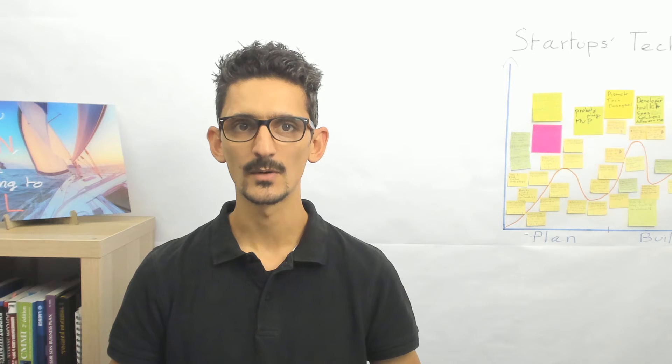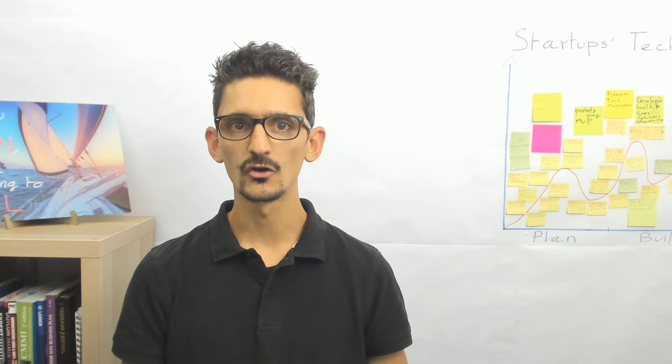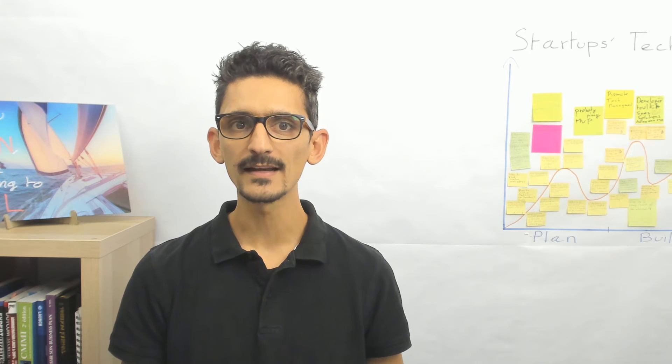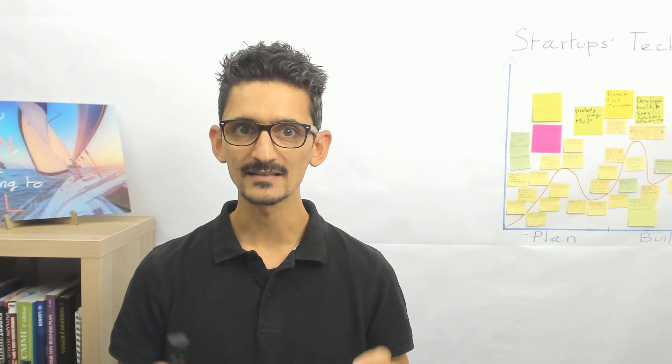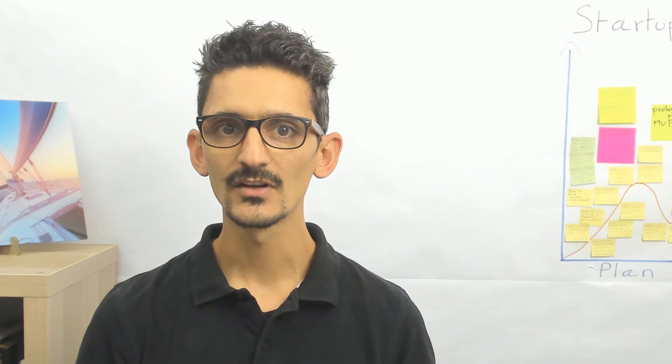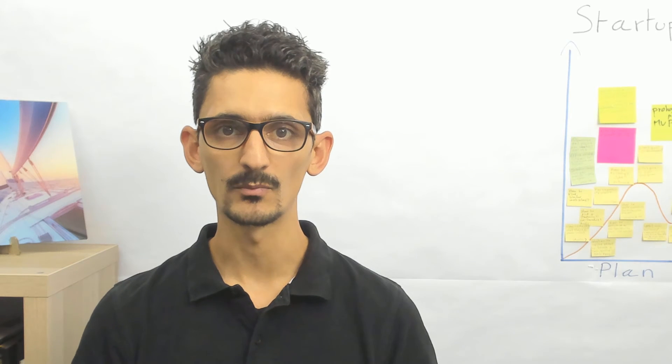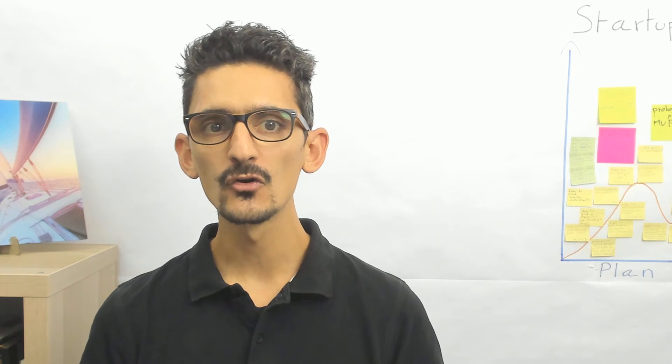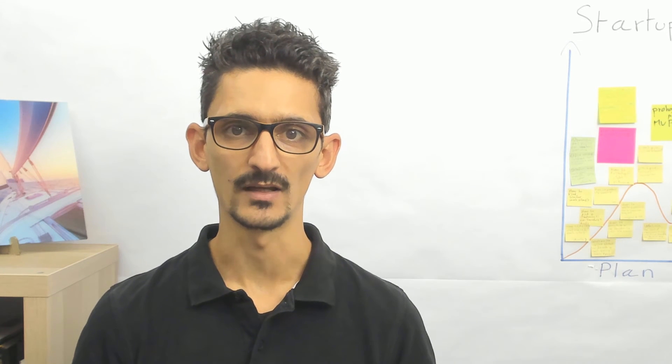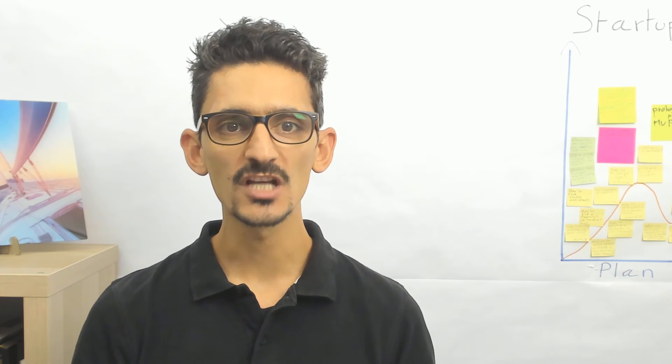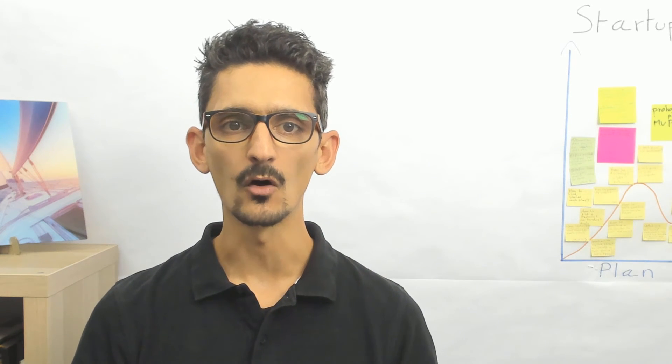So to conclude and answer Sabine's question, the process we talked about today—the specifications, the Q&A, the reformulation, the prioritization, the development, and finally the demonstration step—that's the key. To make it even more efficient, ask your provider to connect your project management tool to the developer's repository. It will allow you to have a transparent and clear vision of what your developers are doing, without having to bother them with a checkup call every two days or send them emails all the time.